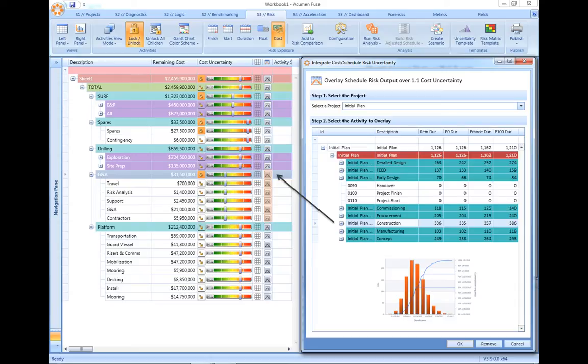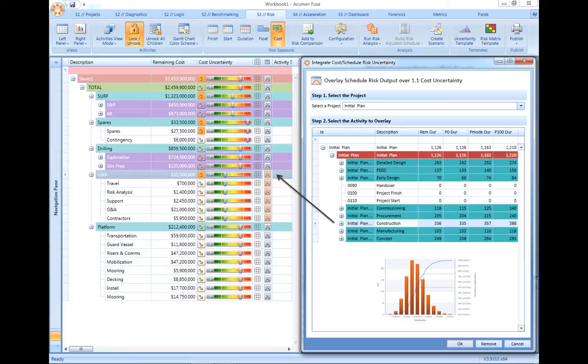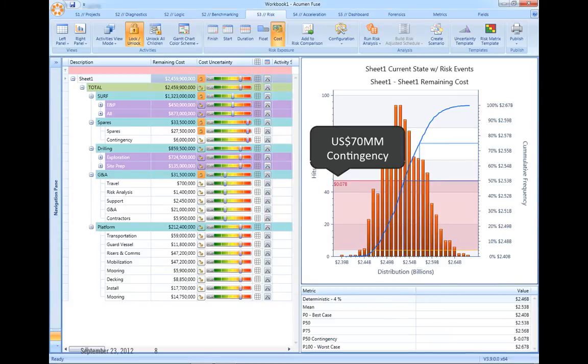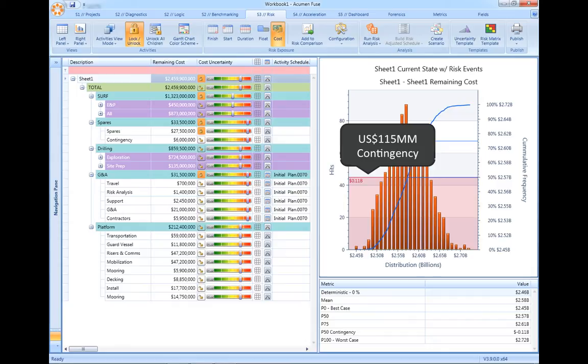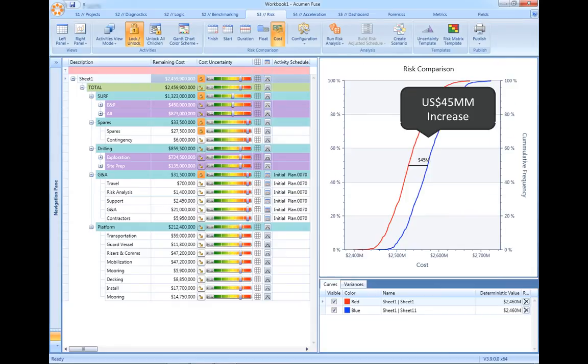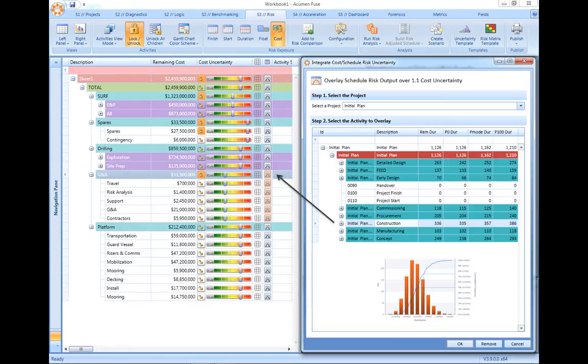The ability to merge the results from our schedule risk analysis and have those directly drive the cost risk model is unique to Acumen Risk. The example here shows a cost risk exposure demanding $70 million of contingency, yet when we look at the additional impact being driven by schedule risk delay, we can see that the amount of required contingency increases from $70 million to $115 million, with a net increase of $45 million. This linking of schedule risk delay into our cost risk model is unique to Acumen Risk.